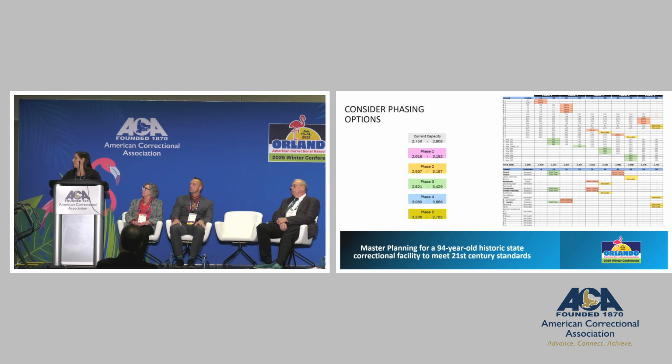And then replace. So over the course of the phasing, though, we were able to keep the 2,750 beds available on site because Ohio does not have the flexibility of moving people off site. And sometimes we were able to get a lot more beds on site if they were keeping the same densities, but it would also allow them to reduce some densities in these spaces as we're going forward, to really reduce the stress and improve the resident experience as we're going forward with the phasing options.